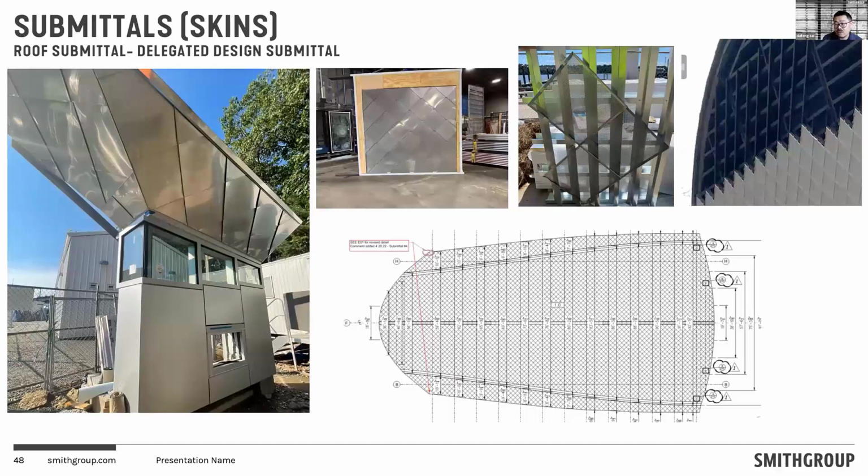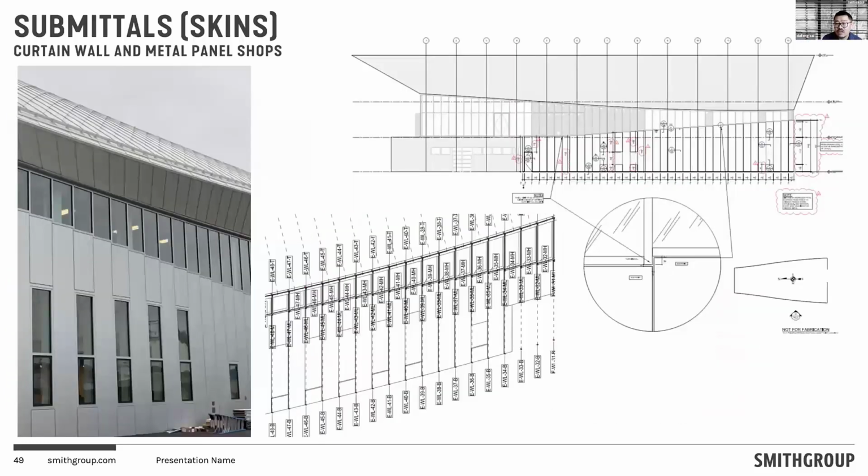And the third category in the submittal, I would think, is the scheme, right? Because now you've got to the finished products of the project, you want to make sure everything comes together nicely. Like most projects, we do a mock-up to make sure all the details look right and everything comes together nicely before we really apply all these things to a real building. And a lot of detail needs attention at this level.